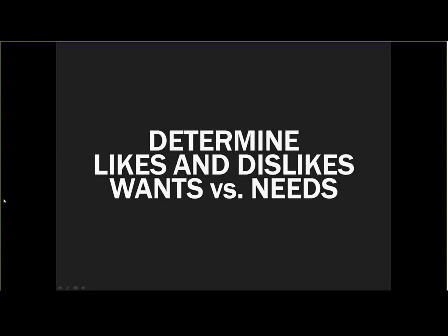So it's also a good time to discuss and document wants versus needs for your site, because there's likely some functionality that you need on the site, and that should be documented. But if there's functionality or features you want but don't necessarily need, like maybe items that could be optional or considered in a later phase of the project, be sure that's indicated so the most important needs are met first and the wants can be addressed separately.